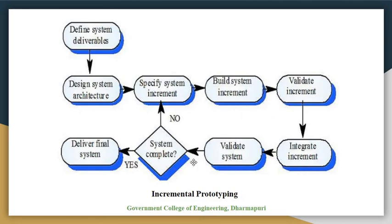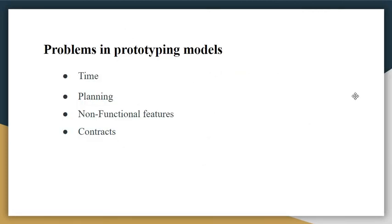Next we will see what the problems are in prototyping models. The first problem is time — building a prototype takes time, and in throwaway prototyping it can be seen as precious time taken away from the real design task. The second problem is planning — most project managers do not have the experience necessary for adequately planning and costing a design process which involves prototyping.